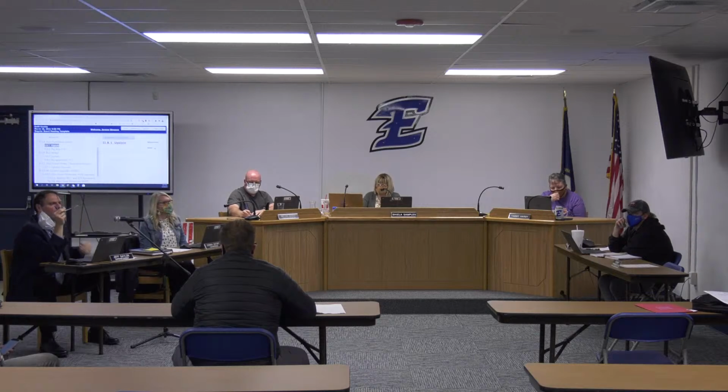Now, Area A, we just started last week, put in the first coat of block fill on the CMU walls. As far as MEP work goes, we're about 90% right now for rough-in MEP in Area A, which is great. We're well ahead. We got windows going up in Area A, as you can see. As you drive up through the parent loop, you can look to the right and see all those windows being installed. So it's really starting to look great.